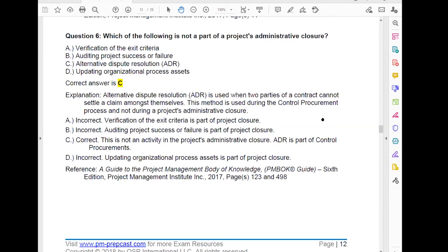Here in Singapore, sir, there is that. For steel structures, in my case, there is also accreditation for qualified persons who can handle cases. But most likely this falls under the QS, regarding contracts and disputes. Those chosen are not necessarily lawyers; whoever is related to the project, experienced and accredited, can be taken as the mediator. That's one form of ADR here in Singapore.